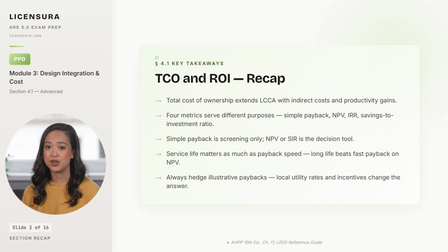Simple payback is a screening tool that ignores both the time value of money and what happens after payback, so it does not belong in the recommendation slide of a real value engineering presentation. Service life matters as much as payback speed. A long-lived system with slow payback beats a short-lived system with fast payback on net present value every time. And finally, hedge your illustrative paybacks. Utility rates and incentives change too fast for typical figures to read as commitments without that hedge.